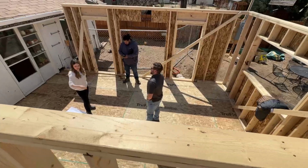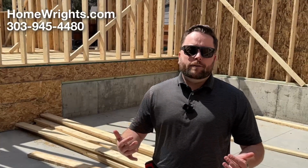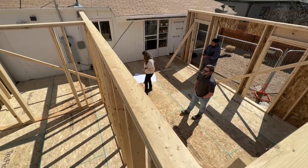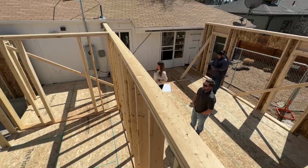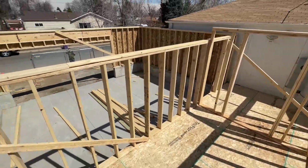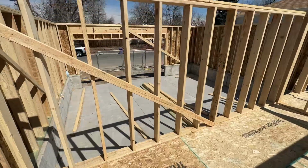As an owner builder, what are the financial benefits? Right. So doing our owner builder program, there's a big financial benefit. So in a turnkey situation where you're paying a builder to actually build the structure for you, whether it's an addition, remodel, or a brand new house, you're paying them 20 to 25% of all hard costs. So if you order a specialty sink from overseas, they're going to tack on 20, 25% right on top of that.